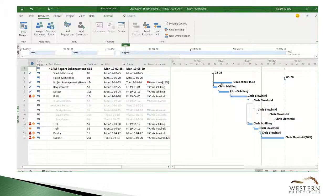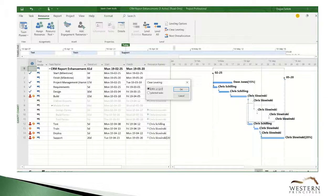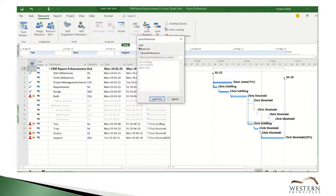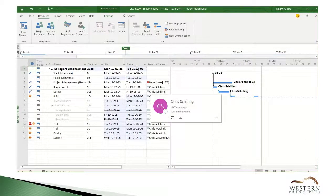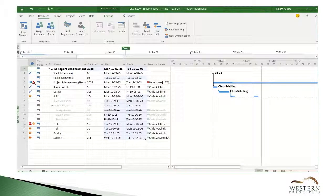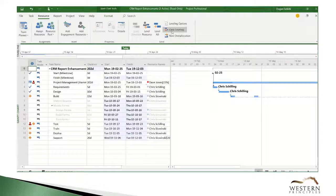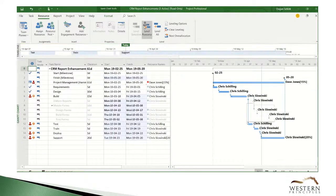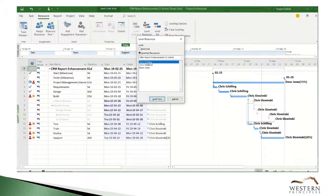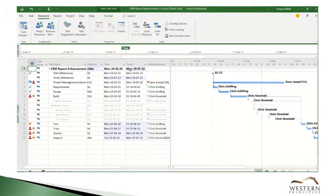We can level the project manager without any effect on the project. We can repeat the process for each of the named resources to determine who is the most over-allocated, and it looks like this developer's schedule is what's pushing the project completion date out to December.